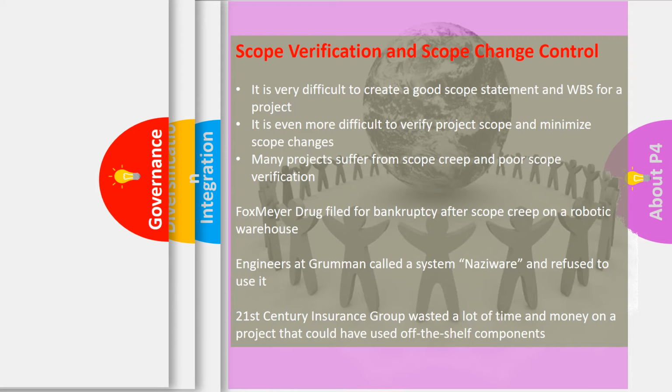When you've actually agreed everything with the stakeholders, and then there are slight changes or not enough detail put in to state exactly what that entailed, other people took it for granted that it would include this and that, whereas it doesn't include these things, so they want them to be added now. So, scope creep, because normally people don't want to pay any more money for additional things, and they still want it done in the same time. So yeah, it's very difficult.